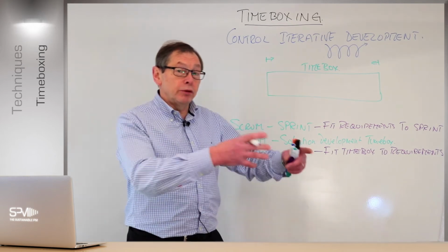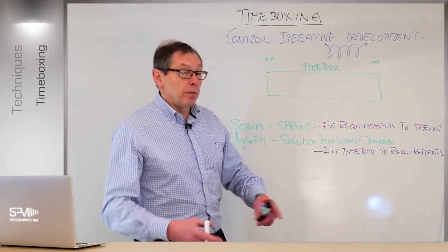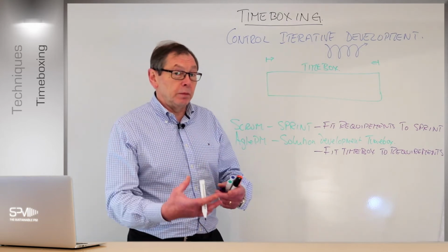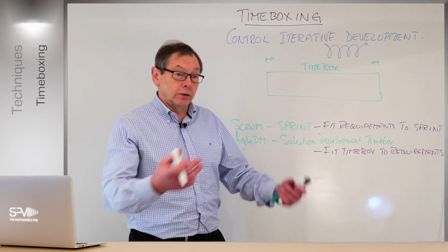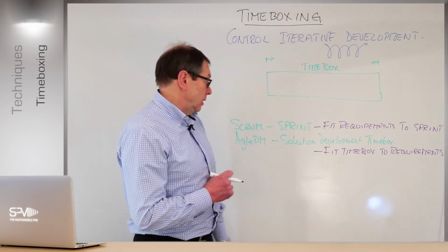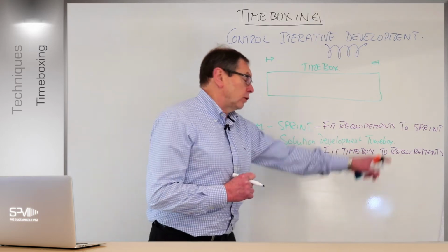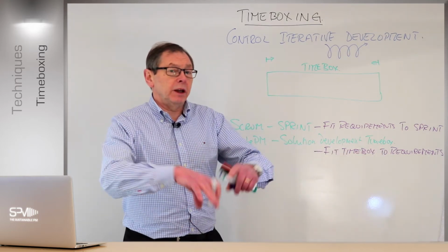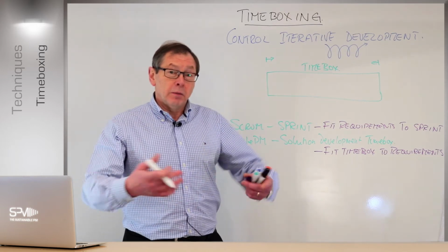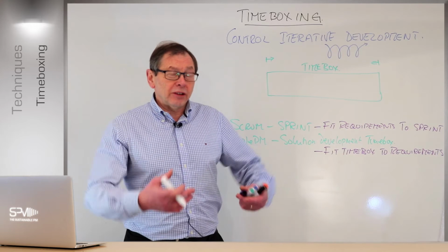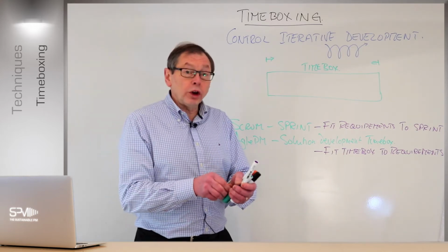This is bolting the project together in pieces as well, which is a bit like doing it here. We're bolting the requirement together in pieces as we build it, or we're bolting the project together in pieces as we go through the project's life cycle, through the delivery plan, as you like. But the main difference here, in a project, we fit the time box around the requirements. That means I'm going to spend the time I need to build the requirements. Yes, it's still estimated, but that's the point. We're estimating, but we don't want the time box to go over.